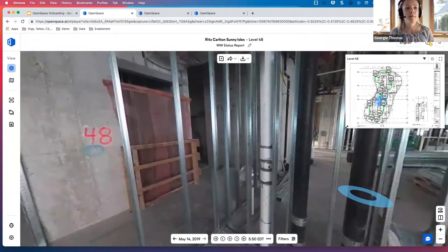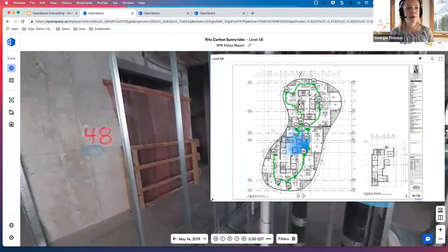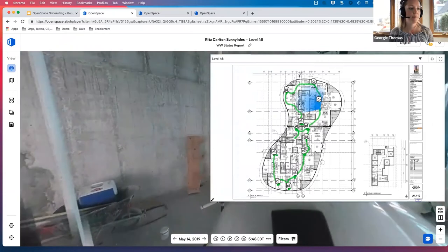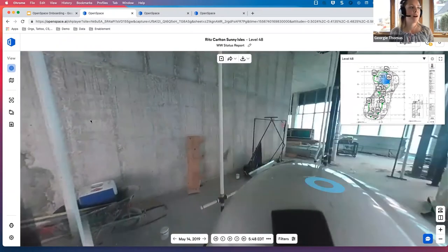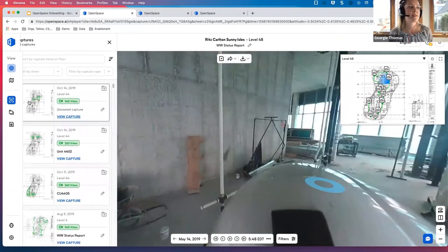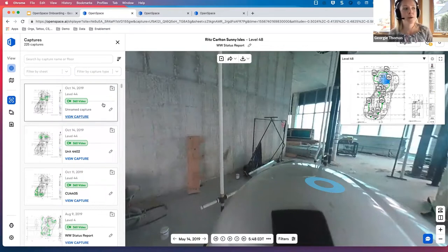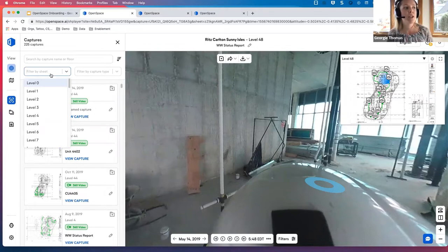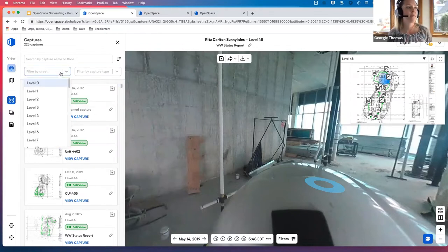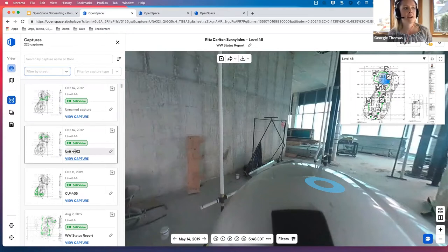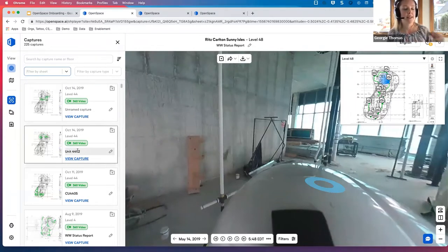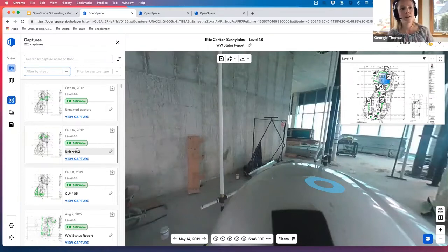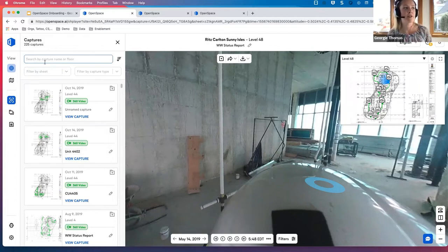So very straightforward, but just to give you an idea, there are different ways that you can move through the job site. I do recommend expanding this mini map view and then selecting where you'd like to travel to. On the left hand toolbar, if I hover over captures, I can see a sequential list of all of the captures that were taken on this project. You have the ability to filter by sheet or capture type. You also can give specific customized names to each capture. So it looks like this job site has done it by unit, but you can also do it by milestone, pre-pour, post-pour, progress walk, you name it.